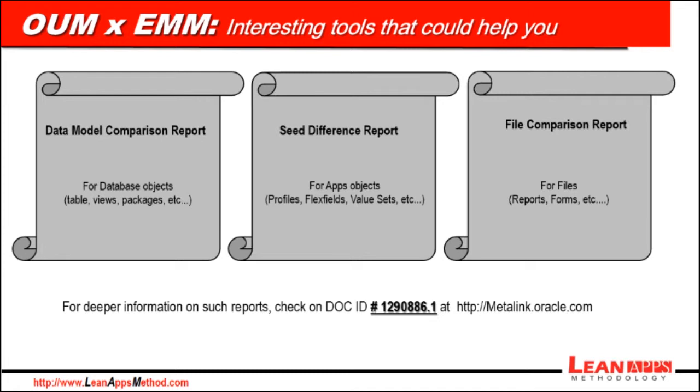Those tools may be well used for developers when upgrading custom objects from Oracle EBS previous version to new release. But you still need to evaluate what custom objects may be laid off due to new features and functionalities that came up in the new version. You also need to figure out what custom objects relate to which customizations. For instance, you may have a huge customized feature that includes packages, triggers, forms, and workflows. And if this customization is decided to be laid off, you must be able to relate it to the custom objects that address that customization.